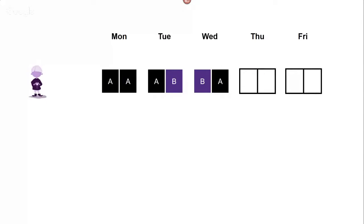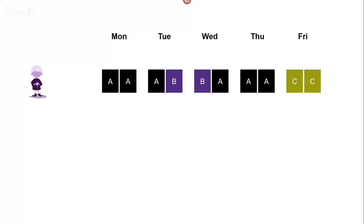Okay, so then we know that Nigel is great for projects A, B, and C, and we look at the schedule for these projects, and we know that project A is urgent and is happening now, so Nigel should be working on it. So he'll spend all day Monday and half the day on Tuesday working on this project. But also on Tuesday and Wednesday, he should focus on analyzing his tasks from project B and start sending questions to SMEs, or requests for materials, access to applications, etc. Because even though he's not going to be working on this project anymore, it's good to set these things up, and it's going to take a few days for people to come back to him. So he has the rest of the week, whatever happens next week, he has some time waiting for the input. Then he goes back to working on project A.